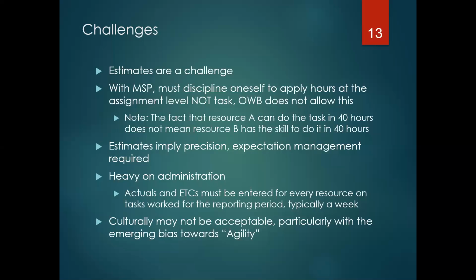As I alluded to when I did the demo right at the end there within Microsoft Project, you're heavy on administration. You need to capture actuals, and you need to have your team disciplined with capturing ETCs. They need to tell you how much more time they're going to need on that, because that's where your predictive capability is, because you're either going to reduce these ETCs, increase them, or leave them. And then the cadence of your actuals is going to dictate whether your critical path increases or decreases.